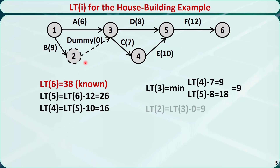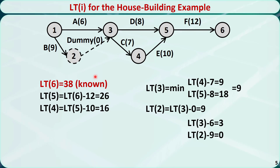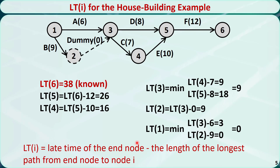For node 2, the late time equals the late time of node 3 minus the duration of the dummy activity, which is 9. For node 1, the late time has two options: the late time of node 3 minus the duration of activity A equals 3, and the late time of node 2 minus the duration of activity B equals 0. We pick the smaller value, 0, as the late time for node 1. As a general rule, the late time of node i equals the late time of the end node minus the length of the longest path from the end node to node i. For example, for node 3, the longest path from the end node is 6→5→4→3 with length 12 plus 10 plus 7, equal to 29. The late time of end node 6 is 38, and 38 minus 29 equals 9, which is the late time of node 3.